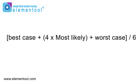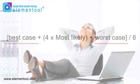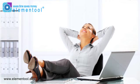PERT is effective because even though it gives much more weight to your most likely estimate, it also takes the best and worst case possibilities into account. You'll find that it truly makes the difficult job of estimating so much easier.